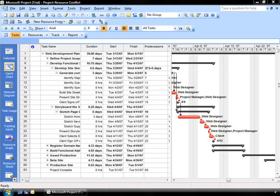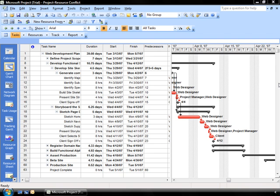Now, when we use Microsoft Project to do that, Project will check the resources calendar to make sure they're available so that it's going to be following the working time rules that we've placed. So it's going to be working within a regular workday, but it doesn't necessarily check to see whether or not you've already assigned that resource to other tasks.